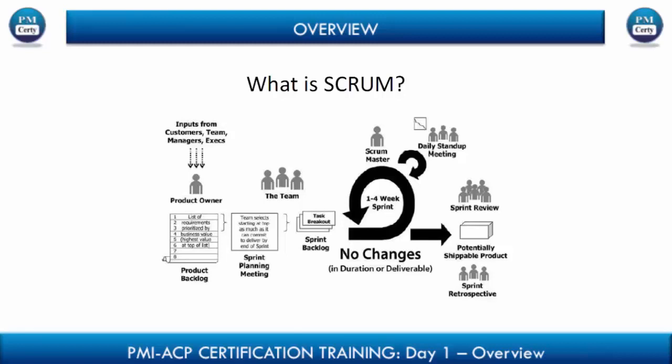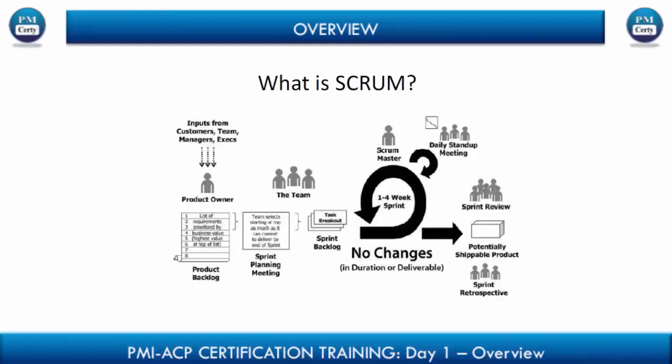So the product backlog is nothing but the set of requirements. In the traditional world, we call it a requirements document, right? Where we have all the requirements listed down. Now, what is the release plan? It is equivalent to your project plan, where you have put down which set of requirements will be done at which point of time. So your release plan is the planning detail across when you're going to do each requirement from beginning to end. Your product backlog is the actual set of requirements that will fit into the release plan. And the sprint backlog is the small set of prioritized requirements that you pick up to do first, because that's the most significant part to produce something of value.